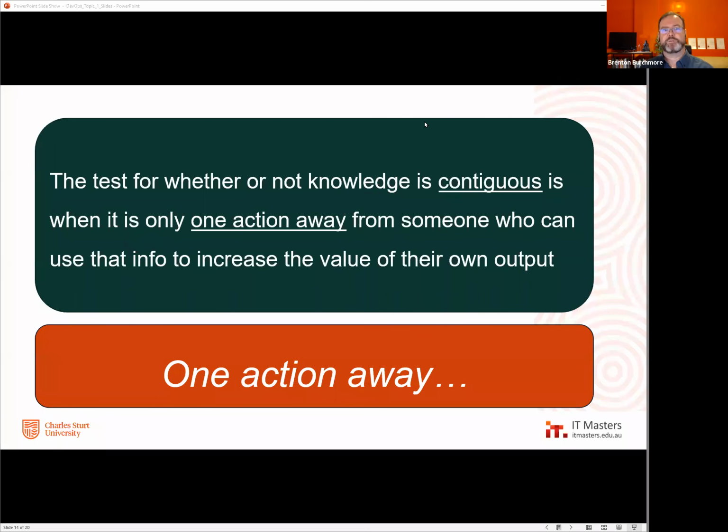But it's not to say that everyone should be open to every interruption. Sometimes you need to schedule and structure them. That's why stand-up meetings were invented. Part of the Scrum mentality, the idea of having regular interactive moments where people can get together and share what it is they need, what it is they're working on. I'm going to work on this today. Hey, Fred, Mary, can you please keep an eye out for something from me? I might need your expertise on this. And I know what you do, so I know that you're the people I might need to call upon, and you know what I'm doing, so that you know the importance and value you would bring by being able to respond. Awareness of who knows what and who's doing what.